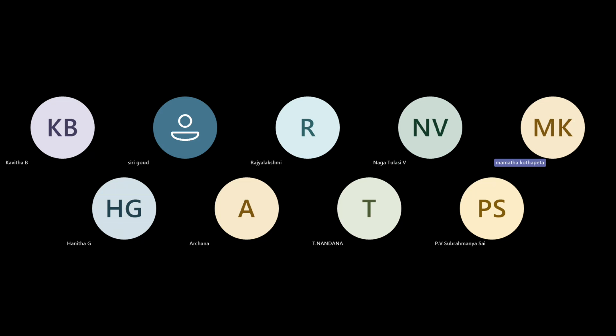Under the subtask, the tester has written all the test cases and executed the test cases successfully. If no defects are there, then it is done. When the developer status is done and the tester status is done, then the user story is said to be done with respect to the definition. That's called the definition of done. It depends on project to project, but you need to understand the meaning of definition of done.